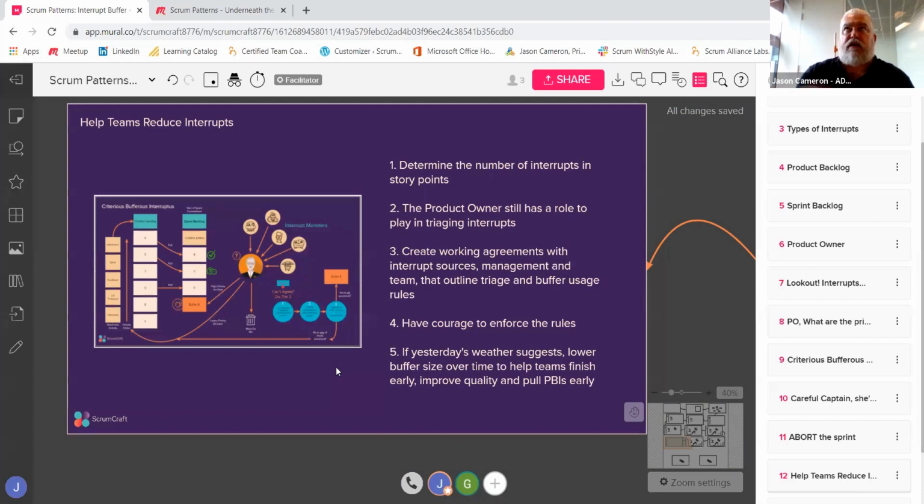So rather than making a determination on whether something should interrupt the sprint, first finish the work and then introduce the scope. Maybe that's a better way of understanding the priority and saying, hey, if we've got a chance, this is a priority decision moment. If we've got a chance, we'll bring that in. I'll put it up in the backlog. But if we get a chance, we'll bring it in. But if not, we'll prioritize it into the next sprint.